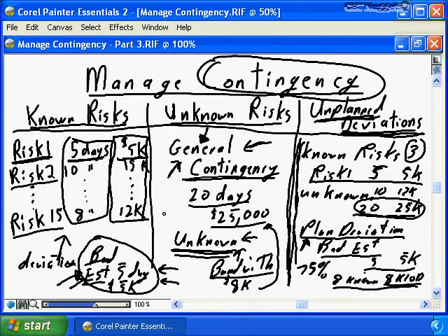The big thing you have to watch is that you're not consuming contingency early in the project to hide schedule deviations, that you are reserving the risk contingency for later in the project, at the 75% complete level, when it is truly known that the project is likely to succeed and that it is acceptable to begin to consume contingency for simple planned deviations, as opposed to reserving the contingency for the actual risk events.